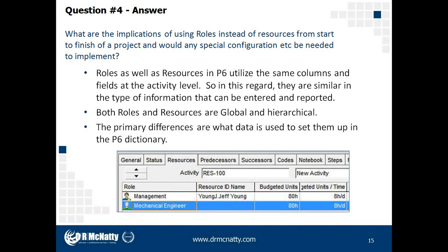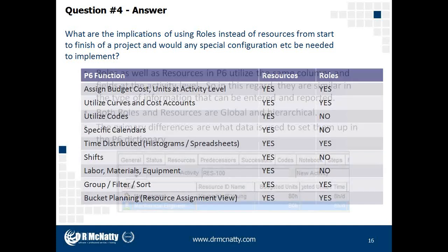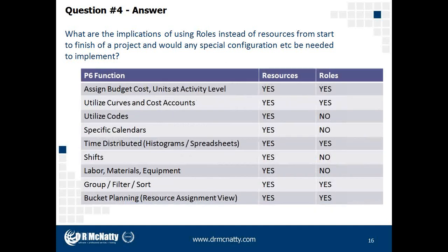Both the roles and resources are global and hierarchical in nature. So for reporting, they can be rolled up to a higher level. The primary difference between our roles and resources is how they are set up in the P6 dictionary. So I put together just a quick little matrix of some common functionality to look at maybe some of the differences between roles and resources.